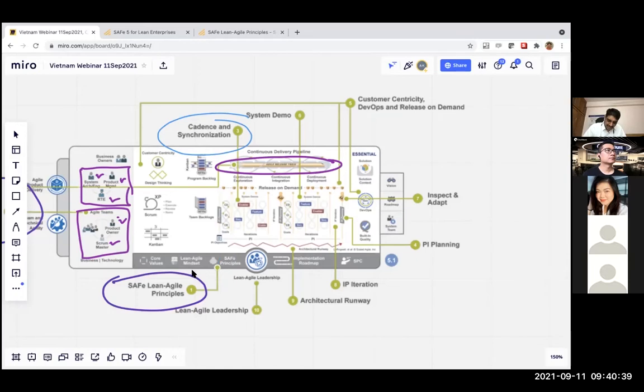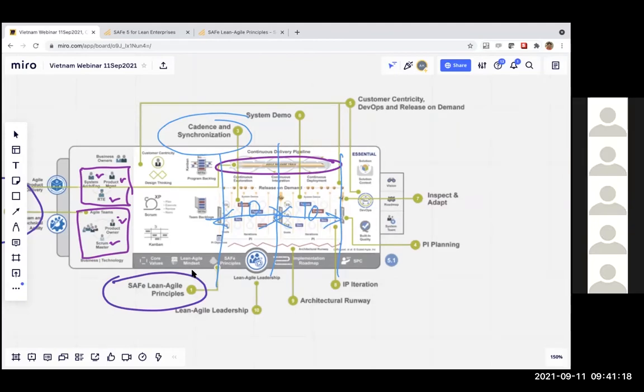But at the train level, I want to put a constraint, which I'm drawing here, which is a 10-week window where we are all synchronized. So at a team level, you have a 2-week window where you are planning and executing. And at the train level, you have a 10-week window where you are planning and executing, right? So this repeats again: 10 weeks, again 10 weeks, again 10 weeks. You keep on repeating. Again, the guideline from SAFe is 8 to 12 weeks. That could be the right timeline. It's up to you. How do you want to start, right?